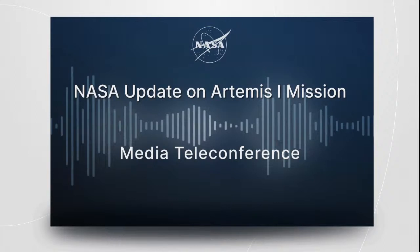Mike? Yeah, thanks, Kathy. From a ground system standpoint, we DCR our ground systems, system by system. We've completed 75 out of 76. We've got one coming up in a few weeks related to a pad ECS system. So we're in really good shape. Everything's on track. We've accomplished all 4 of our operational readiness reviews, the most recent being our operational readiness review for integrated test and checkout, which is the sequence of tests we're getting ready to get into now. So we're in a really good position to move forward with the testing in front of us.